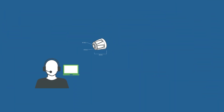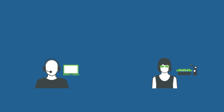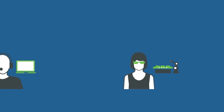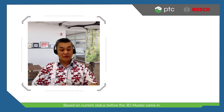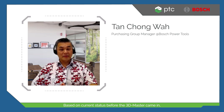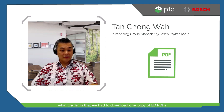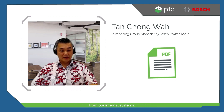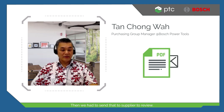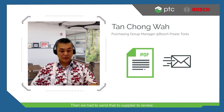After the plastic housing has been designed, the drawing goes to the technical buyer and is then sent to the supplier for production. Based on the current status before the 3D Master, we have to download a copy of the 2D PDF from our internal systems and send it to the supplier to review.